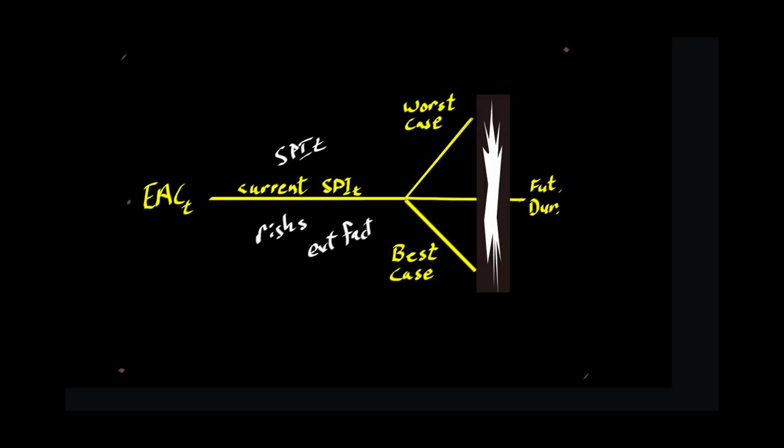If it breaches a threshold, action is warranted. If a trend closes in on a threshold breach, action is warranted. If not, the variance of likely values comes into play. A separate video describes how to set and use the variance. Keep that constraint in mind.